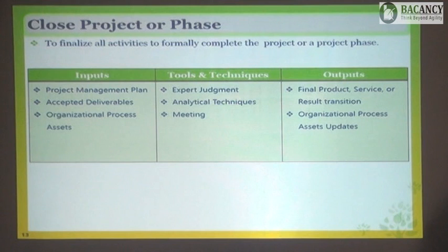So if it is not accepted here, let's say it passed through the QC, the performing team said this is all fine, but the customer said no, the thickness is not good, I didn't like it. Then what will happen is, from check it will go to act, and from act it will go to change. You'll do the root cause analysis of why it is thick. That you'll do in quality. We'll do the root cause analysis and identify the factor which has influenced this, and we will do the work again.